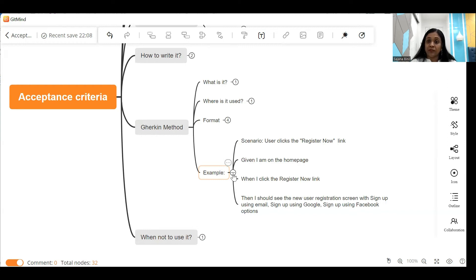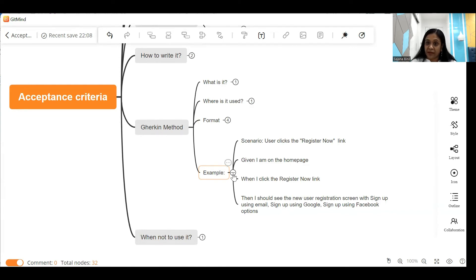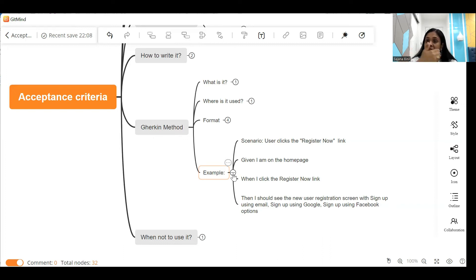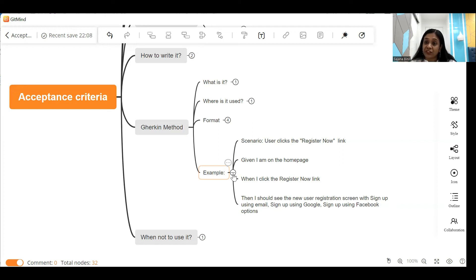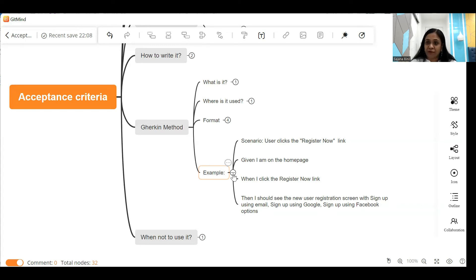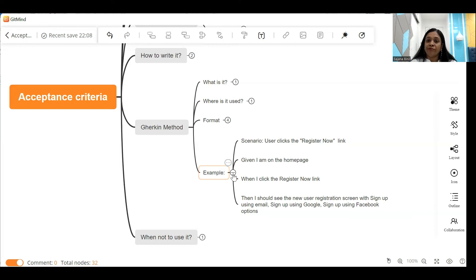So as you see in this example, I start off by giving one line label to the scenario I am describing. I'm describing the scenario for registration. Given I am on the home page - now the registration link is on the home page of the website, so if the user is on the home page that's when this scenario starts. And the trigger for this scenario is when I click on the register now link - this is the action of the user. Then what is the outcome? How does the system behave? Then I should see the new registration page with the following options. So I explain all the elements that are seen on the screen. So this is an example of acceptance criteria written using the Gherkin language.